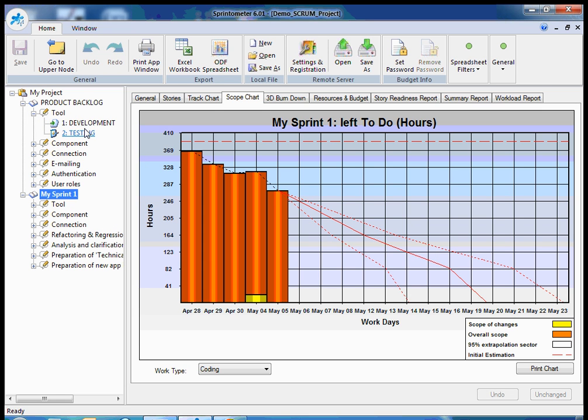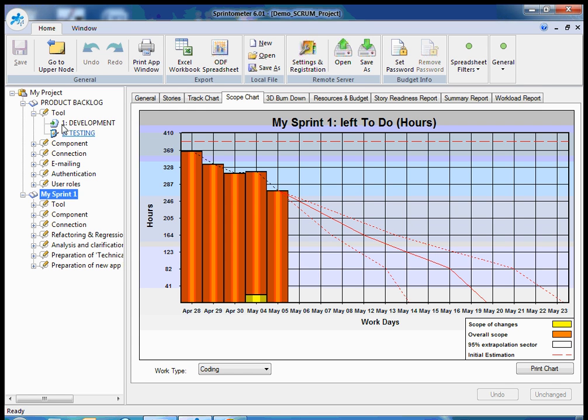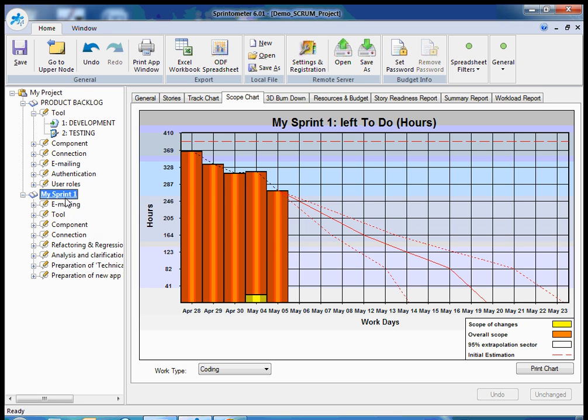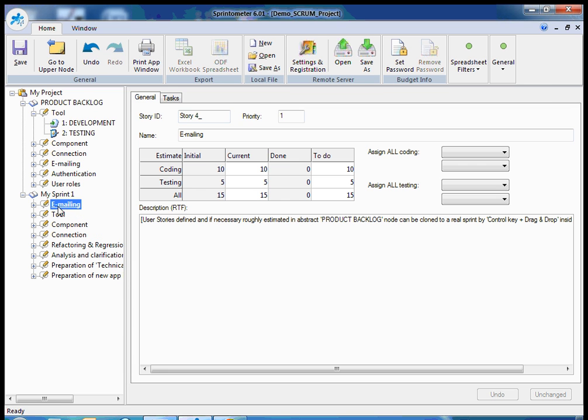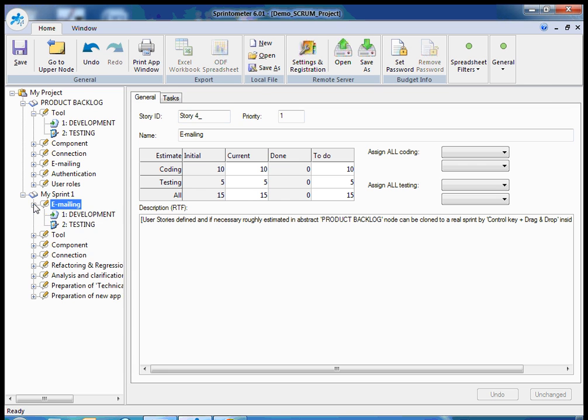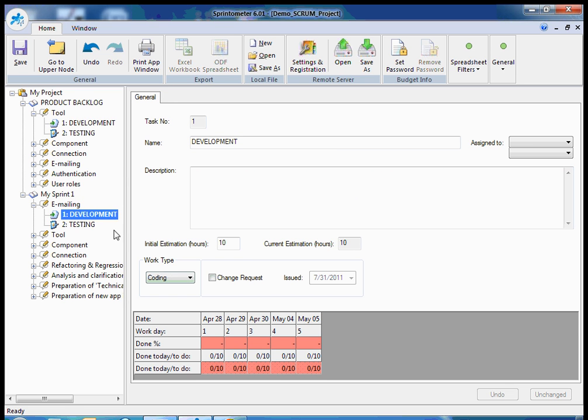With very high level tasks just called development and testing. And if necessary I can clone by using control key plus drag and drop, tasks from my product backlog to my sprint. For example, emailing. I can click control and drag and drop it to my sprint. Then I can change the list of tasks if necessary and estimations to provide more information.